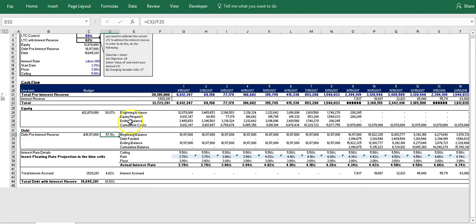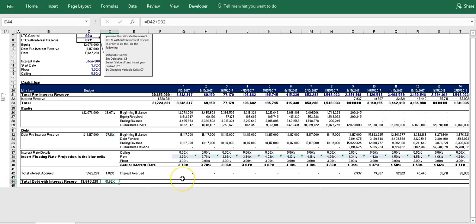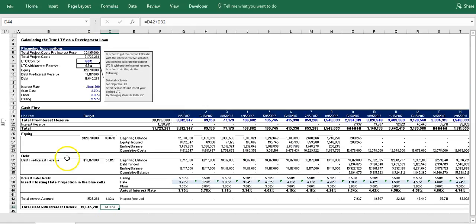And if you'll notice we have these additional percentages set up here, and this is to help calibrate the model. You can see currently that the equity is taking over 38.07% of the construction cost post-interest reserve. The debt is taking on 57.11% plus 4.82%, so the debt is currently funding 61.93% of the entire construction cost.